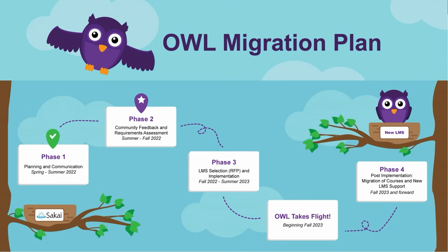Several years ago, Western switched from Sakai, our e-learning management system at the time, to Brightspace. Now this choice was not made arbitrarily. Rather, Western followed a process that included communication with stakeholders to determine their needs in a learning management system. We also call that an LMS for short. This action would likely be described as requirements gathering. And requirements gathering is a common action in the communication activity where you go out and you gather requirements from different stakeholders involved in the project.